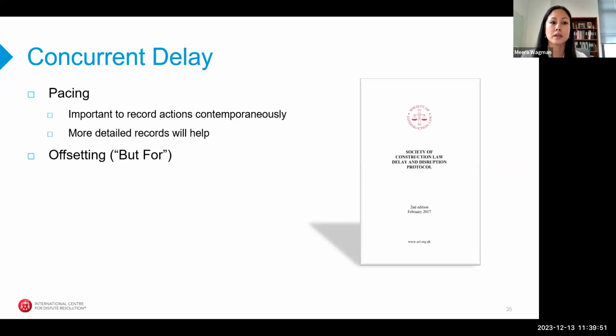So if there is an owner impact to the project, the contractor may elect to slow down or pause or pace its other non-critical works to that owner delay because either it doesn't make sense efficiently to hurry up and wait. They might have materials sitting out exposed to weather for too long. There can be many reasons why a contractor chooses to pace its work to match that employer delay instead of trying to keep up its own activities.